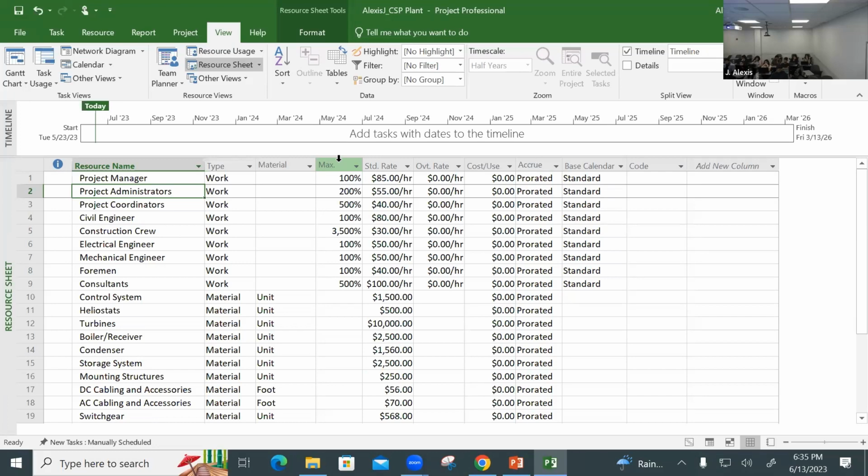I have to work 40 hours first, or whatever the base might be. In some companies, the base is not 40 hours, it's 35. So any hours that I work over the base, they will pay me time and a half. In other words, if I'm paid $85 an hour, they will multiply that by 1.5 times. Okay, so that's the resource pool.